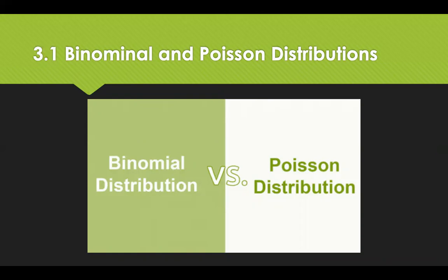The Poisson distribution, which was named after a French mathematician, considers how often something may happen in a given time period. So if a piece of machinery was to be delivered to site, but the ability to do so was weather dependent, the Poisson distribution could be used to assess how often poor weather occurred in that area, so the risk of poor weather occurring on the day the delivery was scheduled could be calculated.